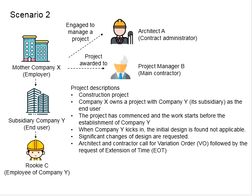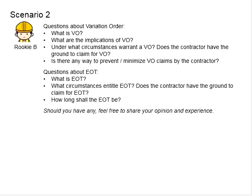Rookie C, an employee of Company Y, was given the responsibility to rectify this. He looked into the entire design and realized significant changes were required. He then requested to the architects and contractors, and they called for variation orders. This means Company X would have to pay for the cost of rectification and redesign. They also followed up with requests for extension of time, EOT. Now the questions arise.